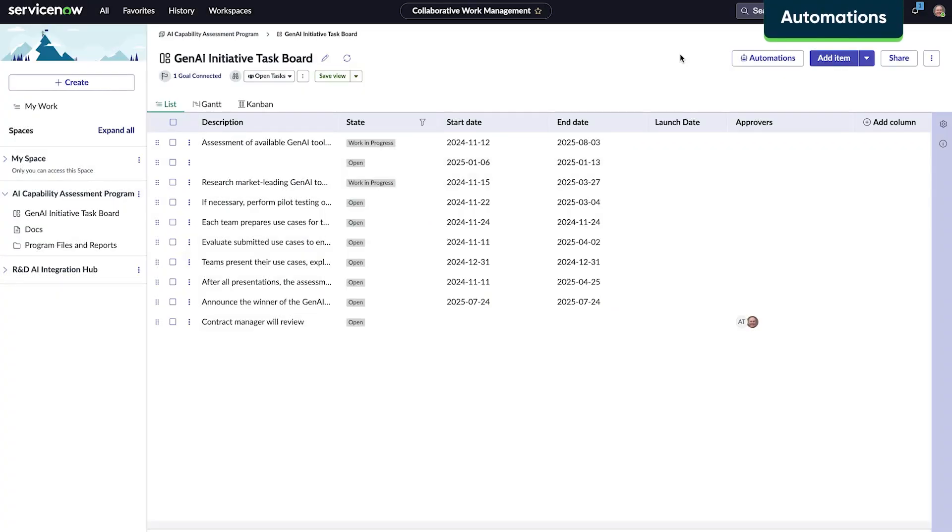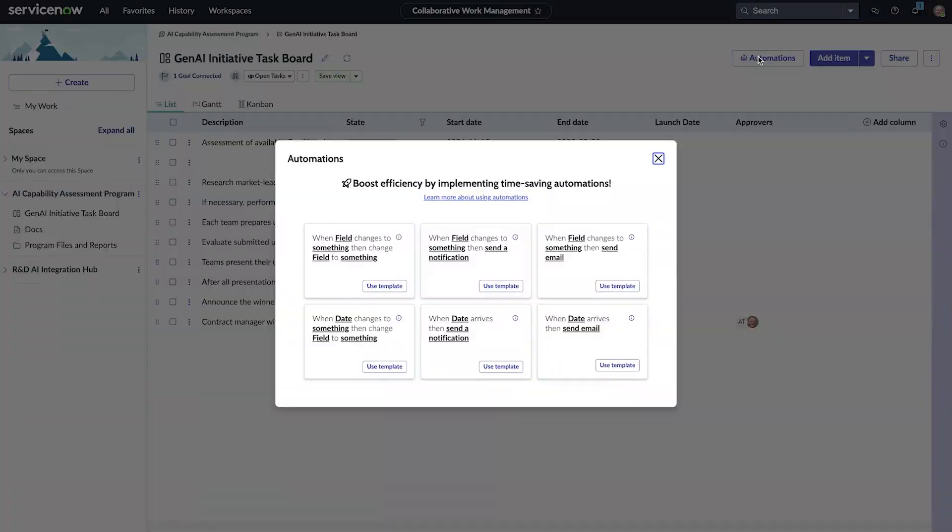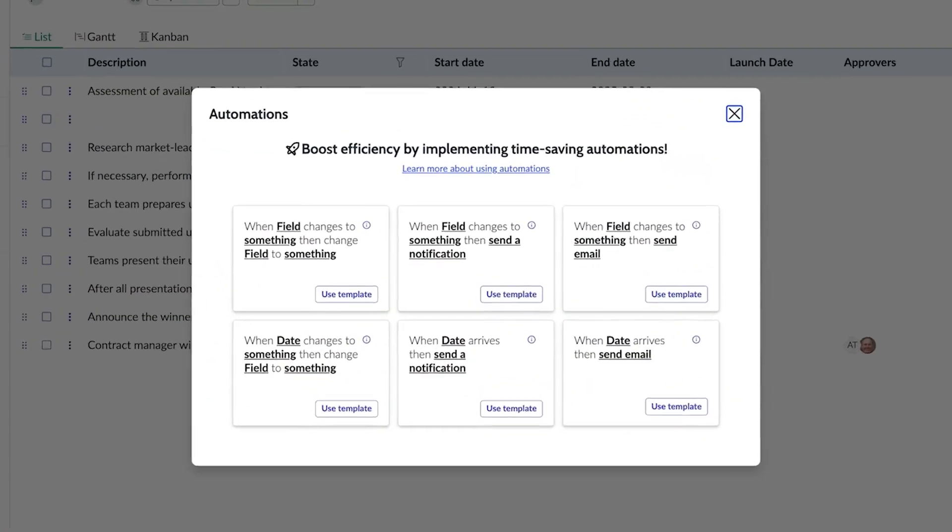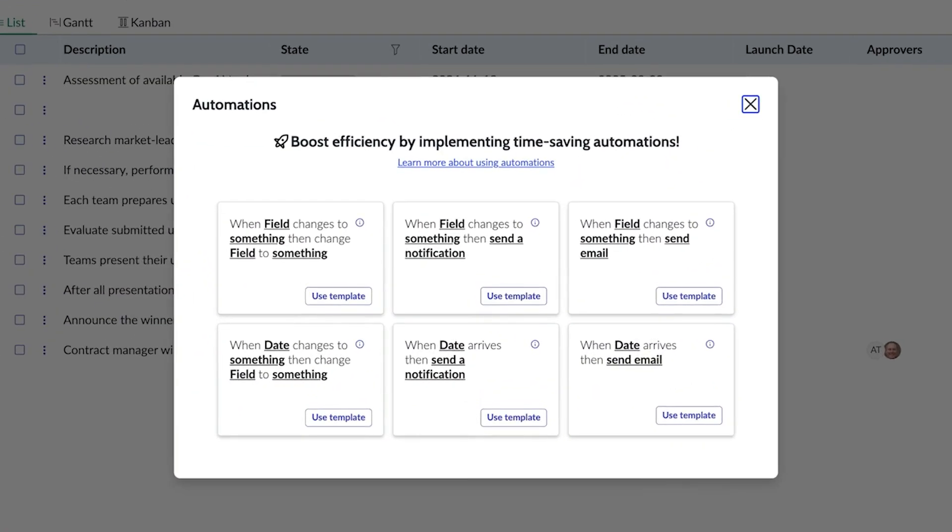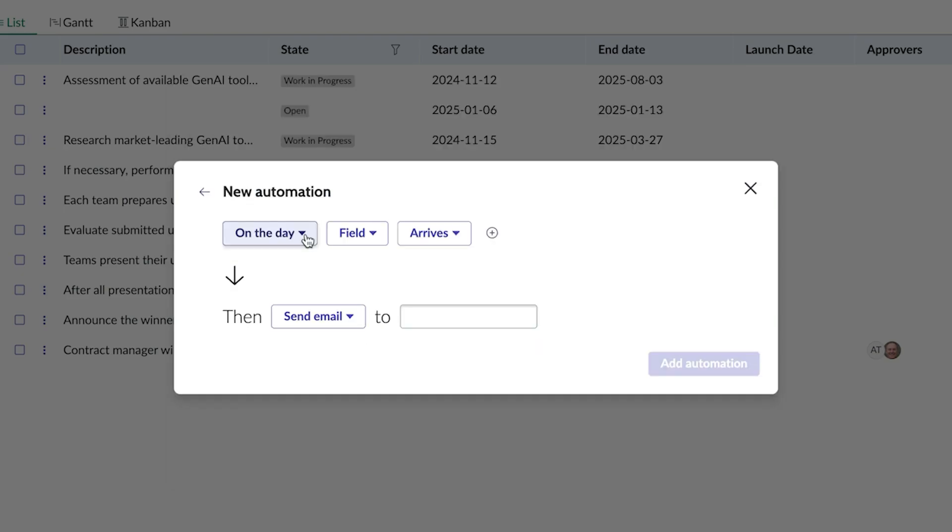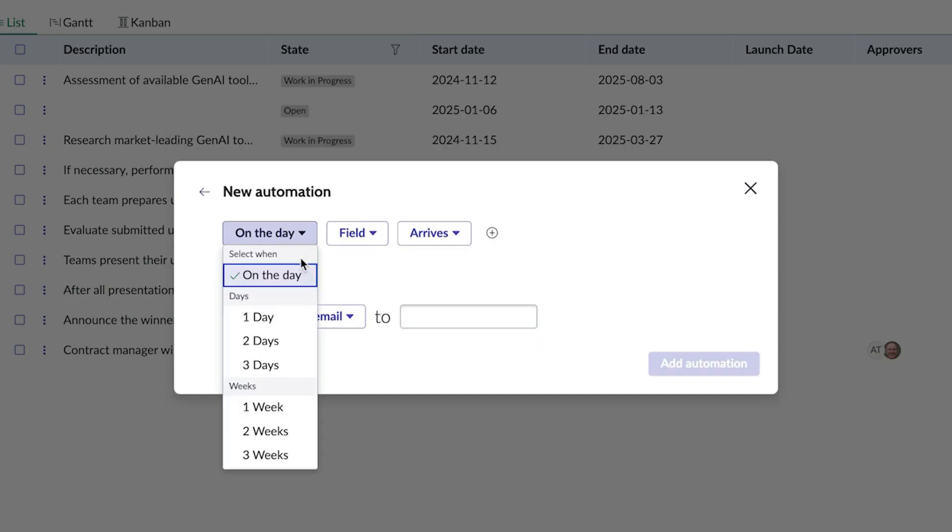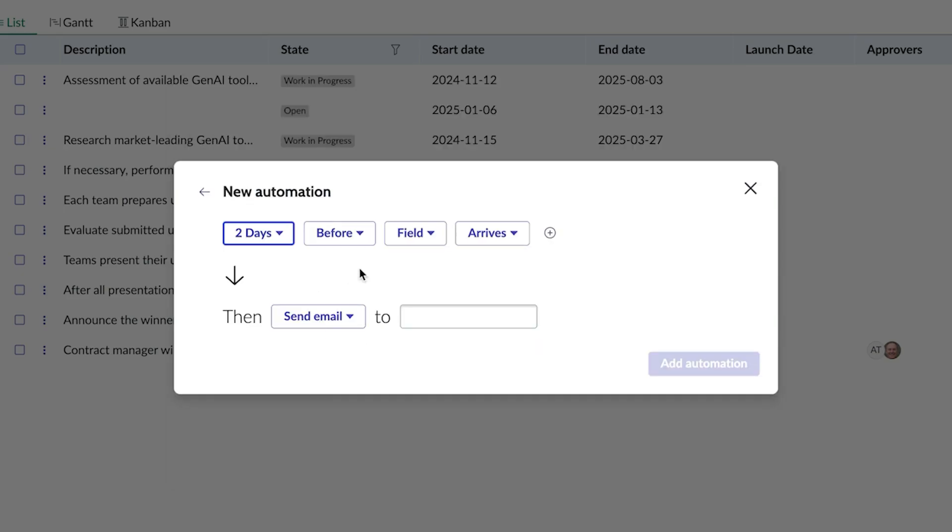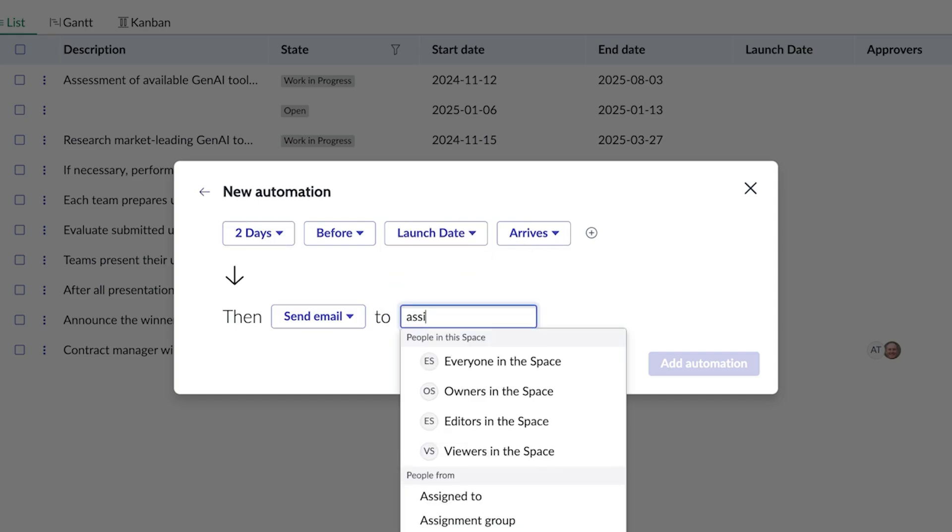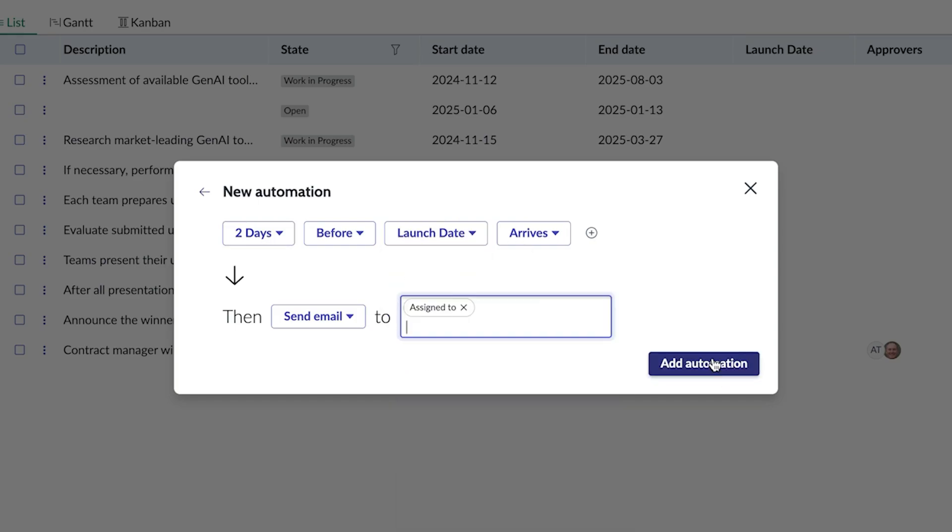To ensure that important dates are not missed, Ryan uses the automation feature to automatically email tasks to all assignees. He has some templates to choose from. He will use the when date arrives, then send email template. To ensure that the launch date is not missed, he customizes the automation to send an email to all assignees two days before the launch date.